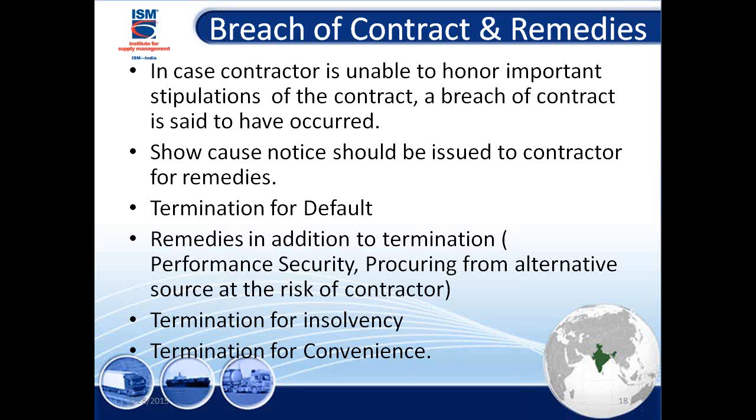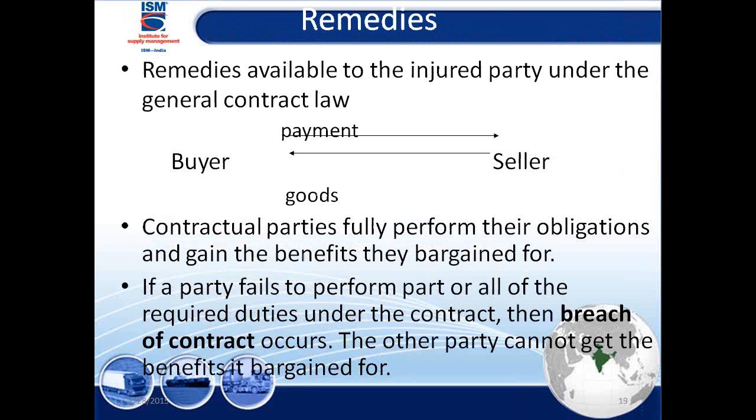The supplier might have started working on it already. So I'm not saying termination for convenience is the easy way. It looks very convenient, but keep in mind, if the supplier has already started working on it, they can claim damages for that. The name is convenient, so you can conveniently terminate it, but if the supplier has bought the raw material, or hired people, they can make a claim from you as well.